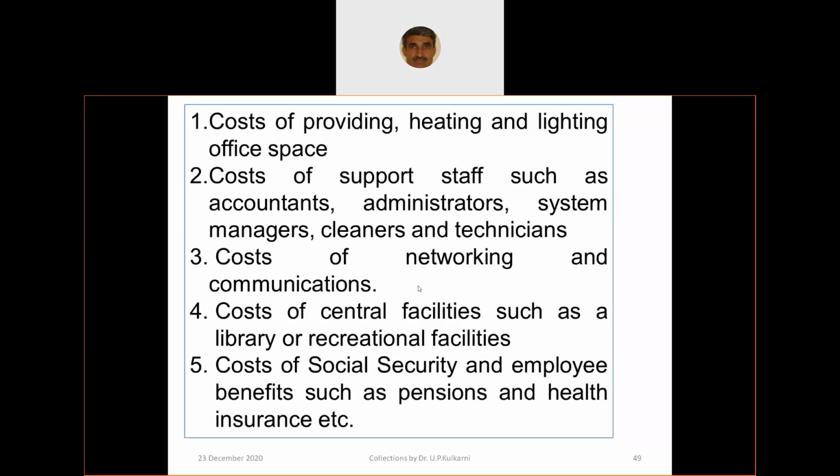Partly it is taken: there are direct things, like the salary component, that get into product cost. And there are many other things. Electricity is probably divided based on certain weightage among all the projects that are going on. The rent of that entire building is again divided among the different projects. Some part will come into this, and then the profit margin. Please look into that with an open mind, work on that, and make a listing. Are you getting it?